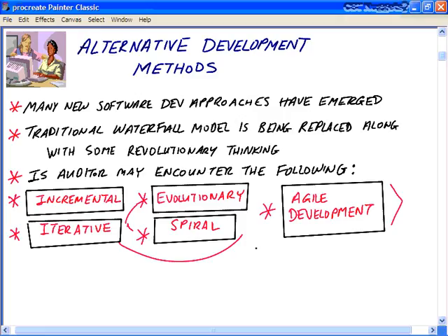In evolutionary development, prototyping is used to build a working model that's used to verify the requirements and needs and explore design issues. Eventually, that prototype gets hardened and then put into production. Spiral development is a series of prototypes used to find a solution. Spiral development basically spirals out from the initial limited prototype to become increasingly more expansive and complex and detailed. Before each prototype, you have formal risk analysis.